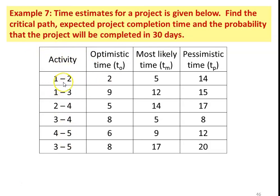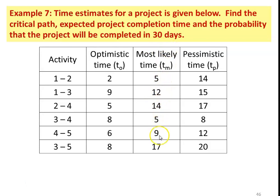There are 6 activities: 1 to 2, 1 to 3, 2 to 4, 3 to 4, 4 to 5, and 3 to 5. The optimistic times are 2, 9, 5, 8, 6, 8. The most likely times are 5, 12, 14, 5, 9, 17. The pessimistic times are 14, 15, 17, 8, 12, and 20.